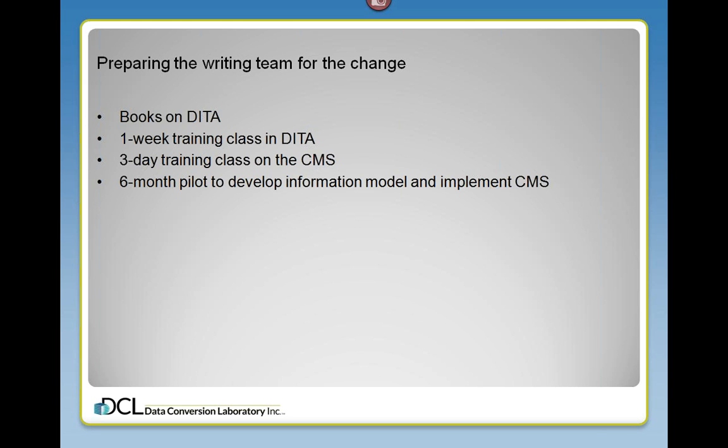They scheduled a one-week training class in DITA with an outside partner, and a three-day training class on the CMS, given by the vendor of the content management system. Most important, they scheduled a six-month pilot period to develop what's called the information model and implement the CMS on our content. Both our partners did a tremendous job during this stage, training us and helping us implement the CMS and the information model on our system.